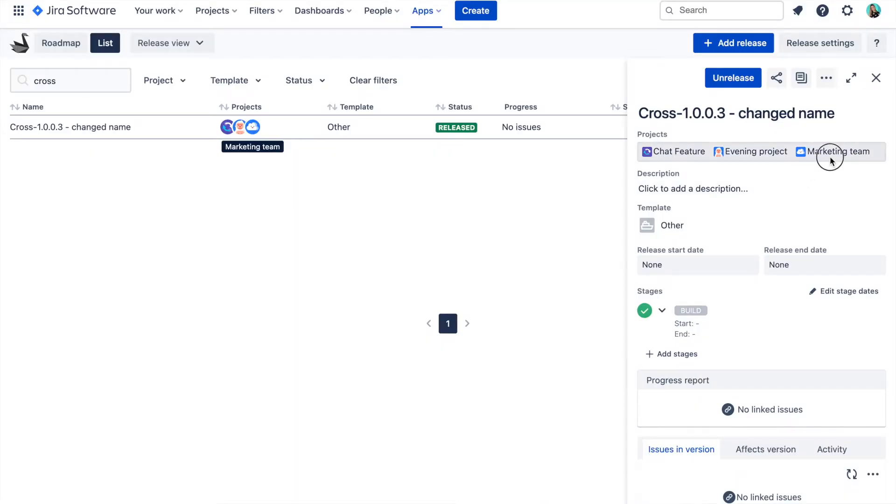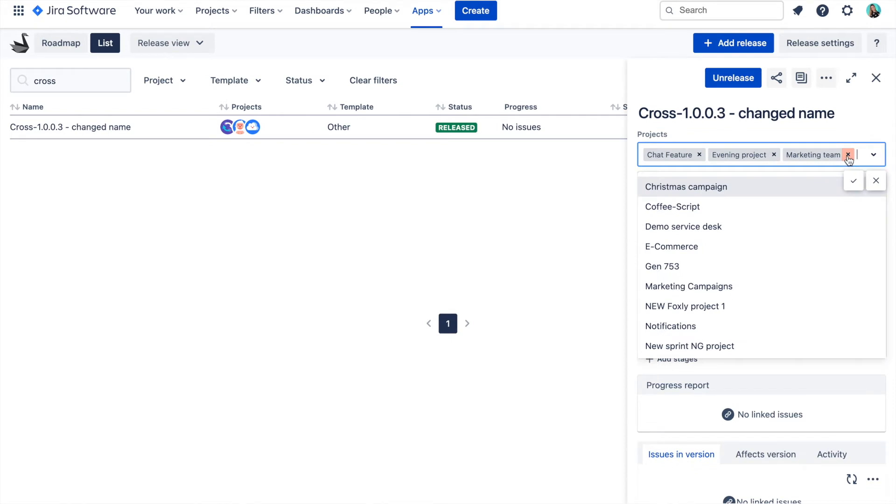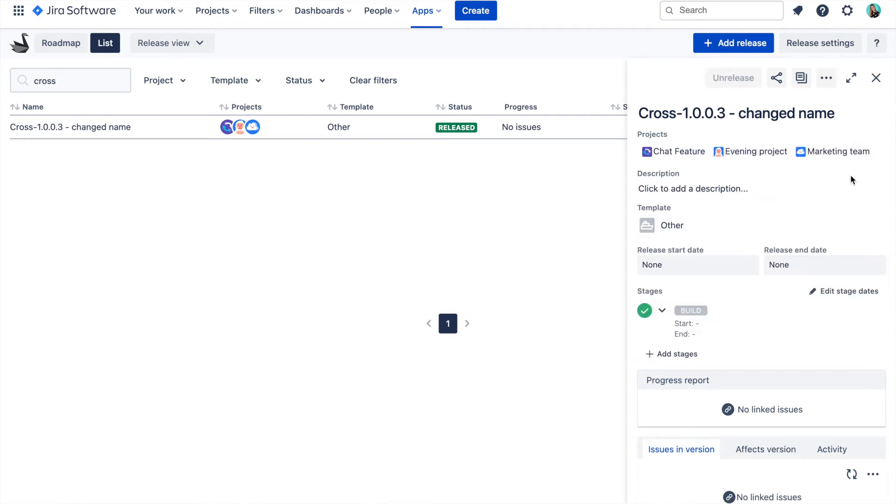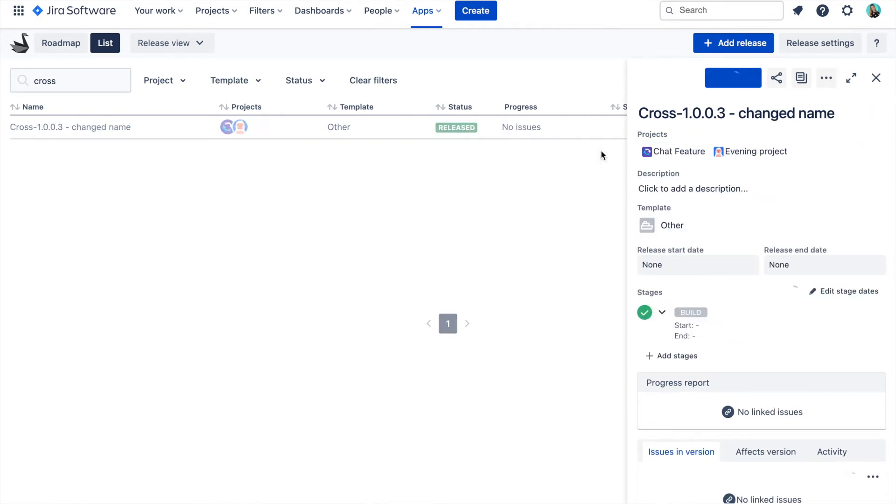If you want to remove the project from the cross-project release, just remove the project from the field and the version in Jira will be removed too.